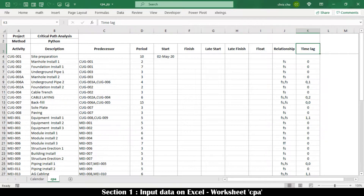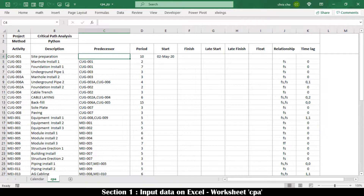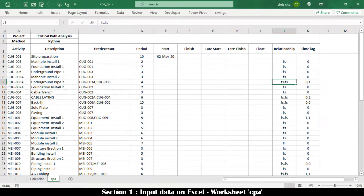The following data are to be defined as essential schedule input: Activity (must be unique), Predecessors (referring to defined activities only; multiple predecessors separated by comma), Activity Period, Start date for activities without a related predecessor, Relationship for each predecessor (either FS - finish to start, SS - start to start, SF - start to finish, or FF - finish to finish), and Time Lag with respect to each predecessor.